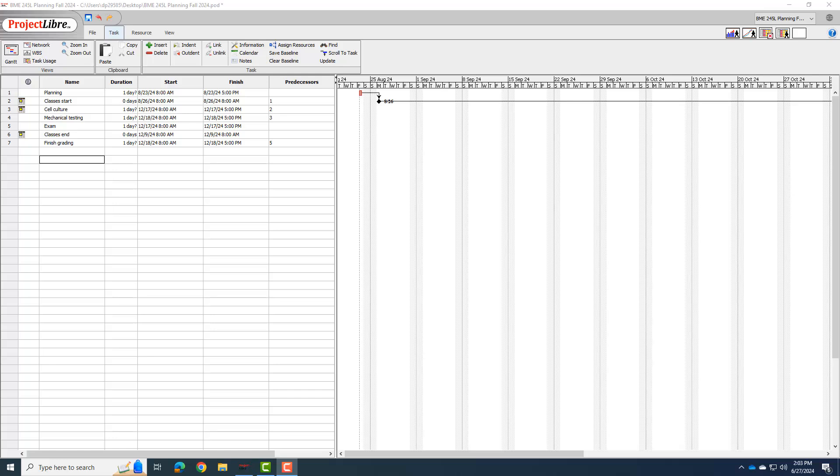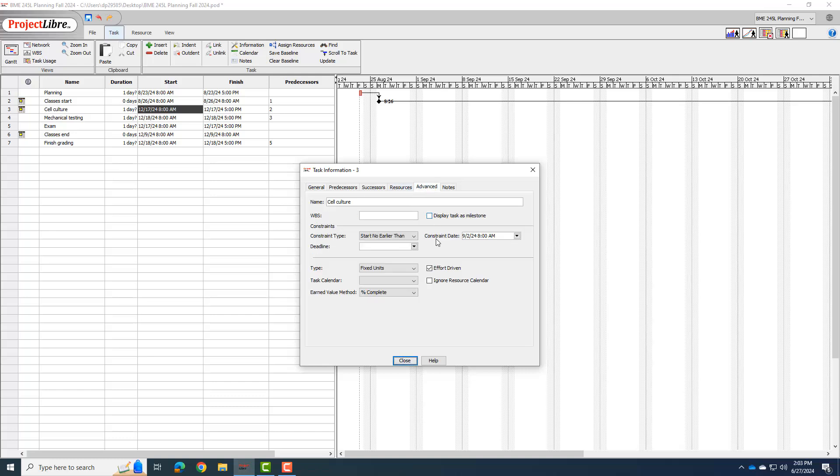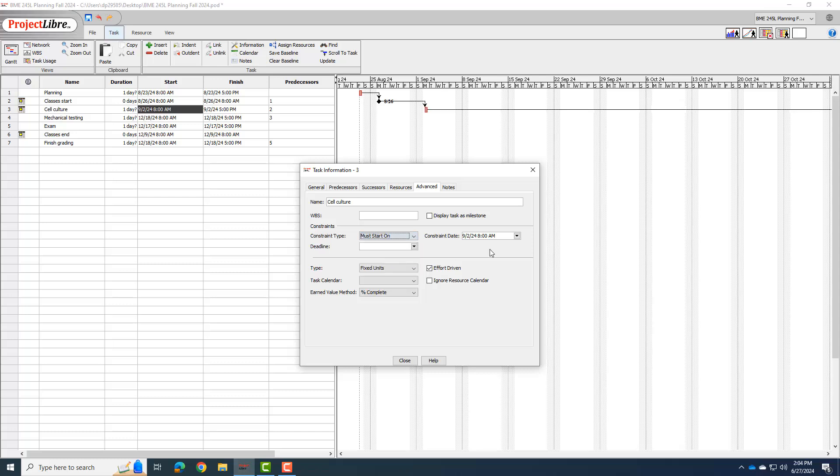So let's start with just setting some known dates for the major phases. One of the known dates here is that cell culture is going to start on 9-2. So I'm going to type in 9-2-2024, I'll hit enter, and you see it didn't let me set that. It reverted back to 12-17. So I'm going to double click it so we can see what's going on. If I go to advanced, it actually put that 9-2 as a constraint. But it says start no earlier than 9-2, but that's not what we want. We want it to start on 9-2. So I'm going to say must start on 9-2.